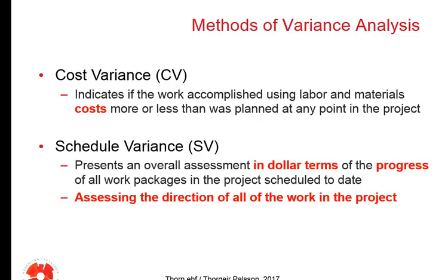The Gantt chart. The tracking Gantt chart is the only way to know exactly how we are developing in terms of time. So remember, this is important. This gives you a feeling for how the project is developing in terms of time, but because it's in dollar units, you have to go to the tracking Gantt chart to see the printout from the baseline, from the planned time consumption, to the real time that we have used on all the activities.